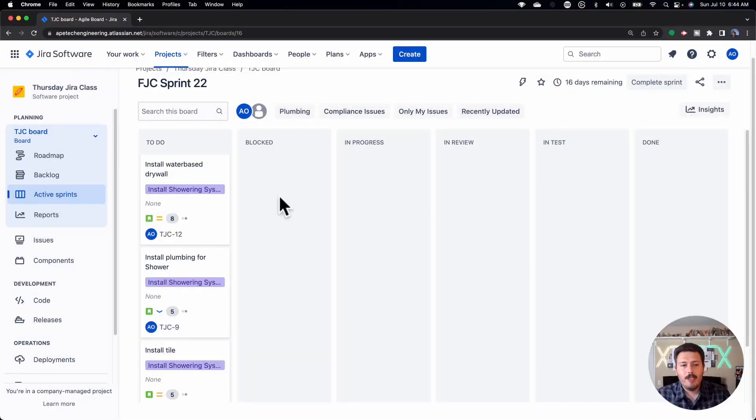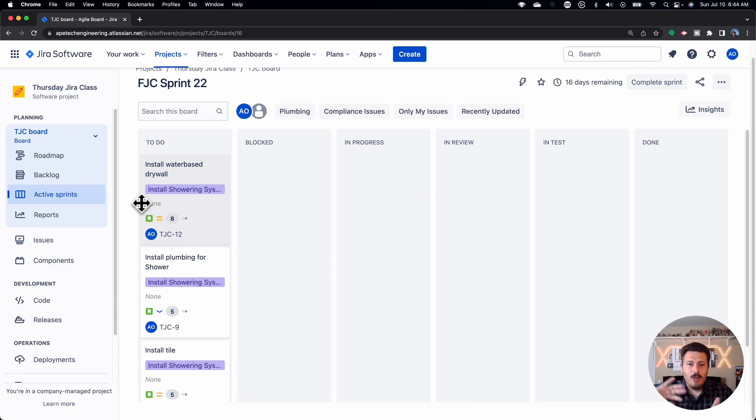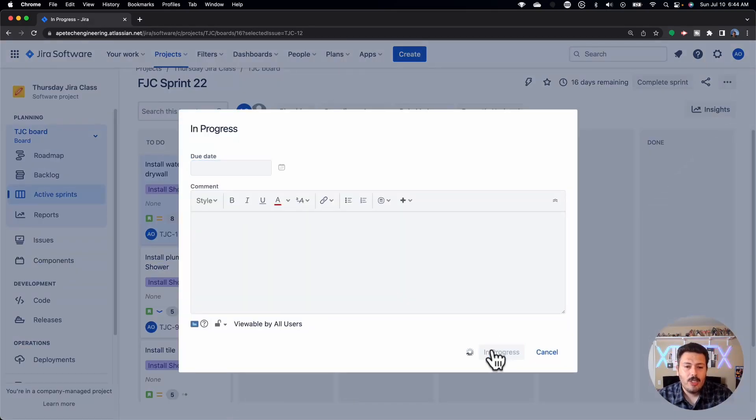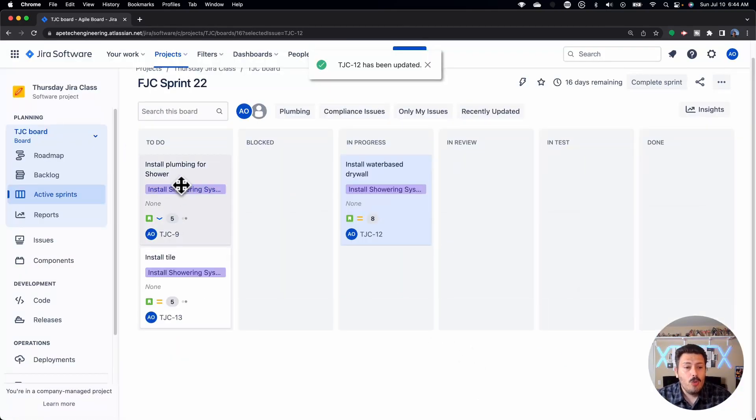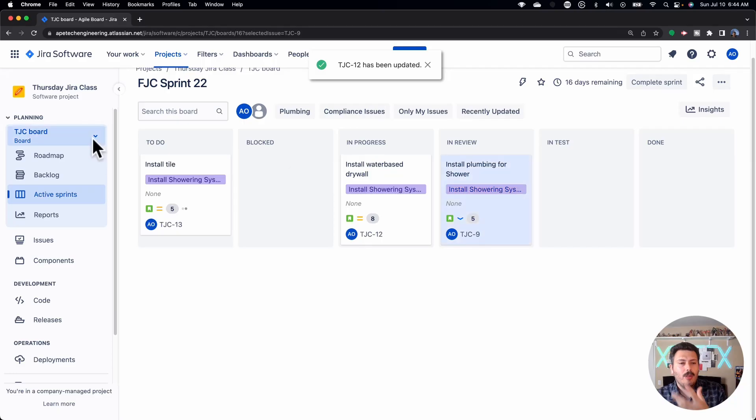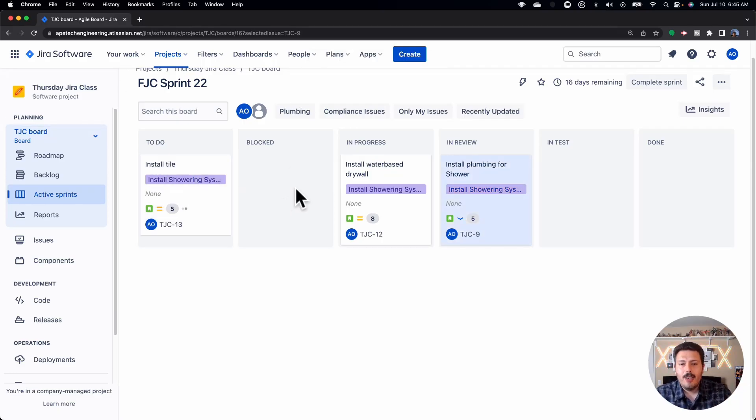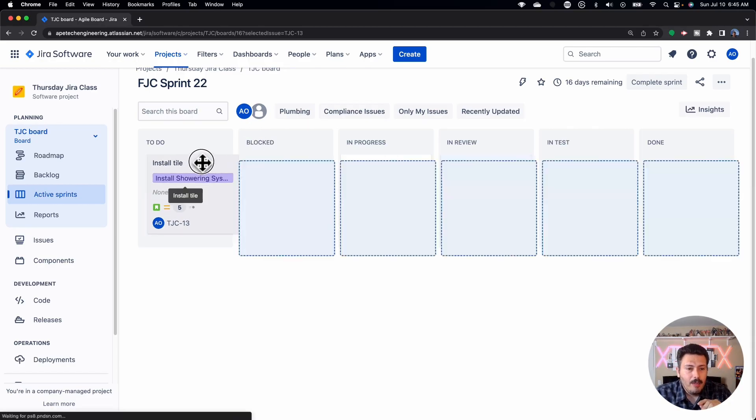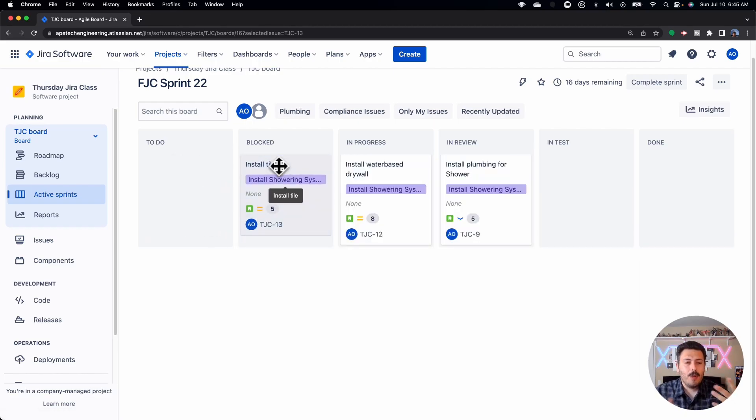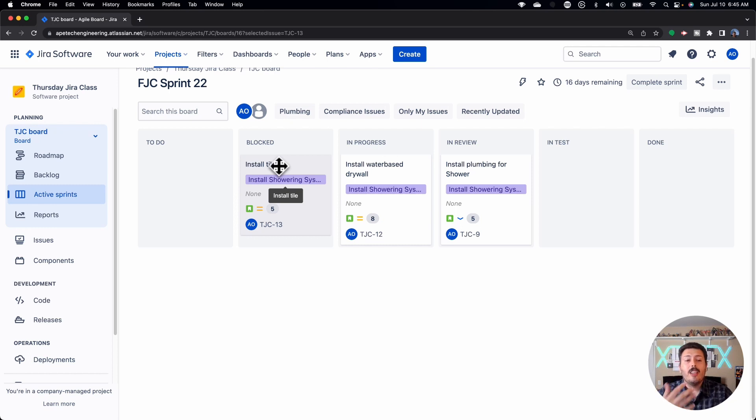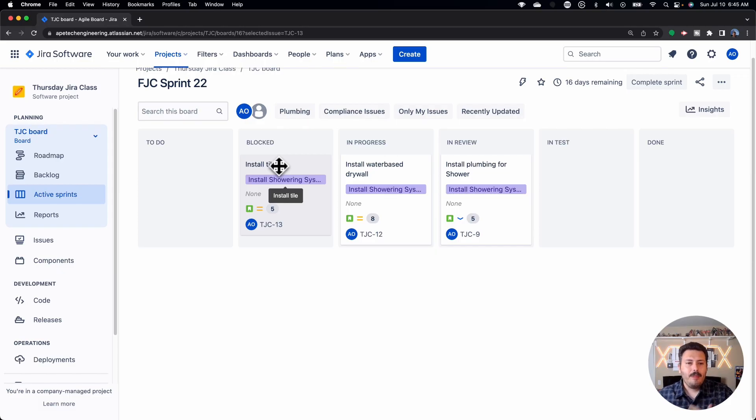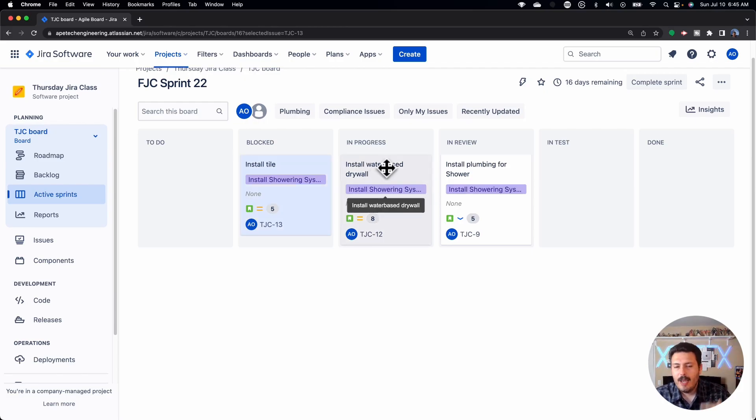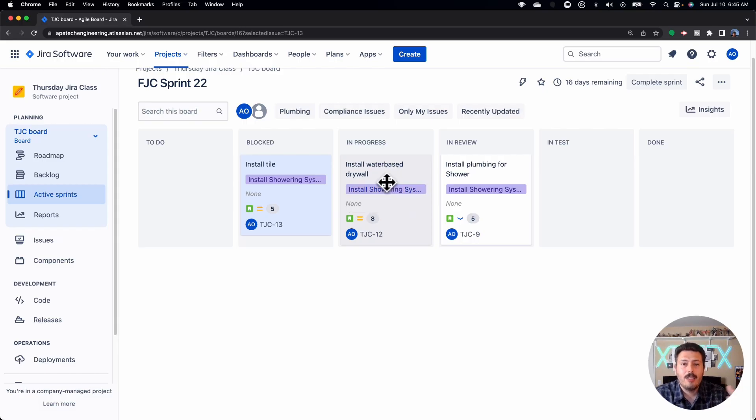From a daily Scrum perspective, your team is fully autonomous at that point. They're going off, they're basically doing all the great work that they need to be doing, and you as a Scrum Master, you're just watching. You're watching for things to essentially move across the board. You're asking your team during your daily Scrum how things are going, because they're going to be doing the what went well, what didn't go well, and what impediments. And having a block column in Jira is one of those things that can help you with those impediments. You can move the issues, your developers can move the issues to blocked. You can address those, you can put them in a parking lot, you can set up follow-up meetings, and try to unblock those impediments. You can also be looking out for stale issues.